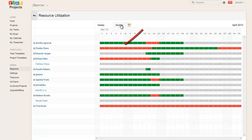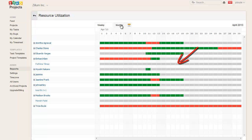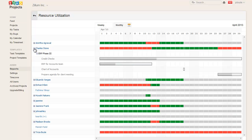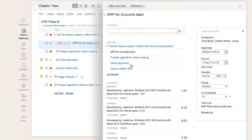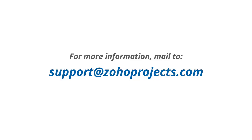A red bar shown against a resource's dates reflects maximum utilization, while green represents optimally utilized and gray represents underutilization of a resource. When you click the bar of a particular team member, it directly loads the task details view from the Resource Utilization Chart. Stay on track and gain insights into team progress with reports.